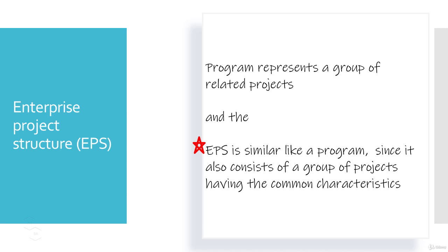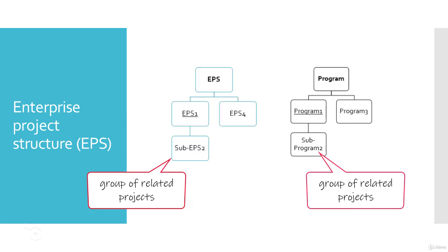So please remember that the important thing here is that similar to a program, we can also create any number of sub-EPS under a certain EPS node. Now, please note that the projects always represent the lowest level of the hierarchy, and every project must be included in a certain EPS node. And these nodes at the highest are root level.